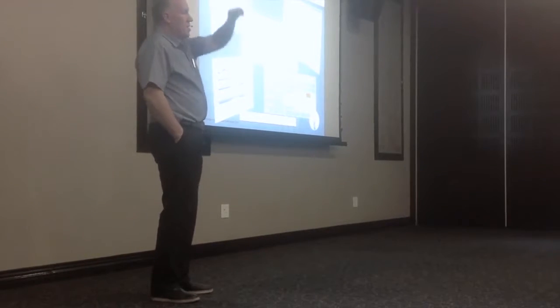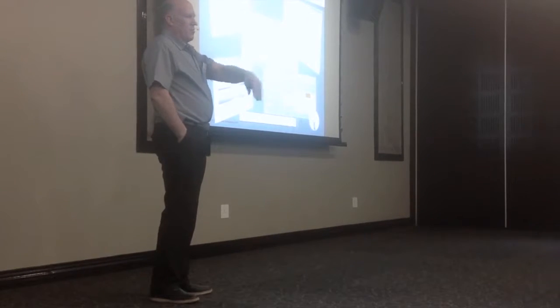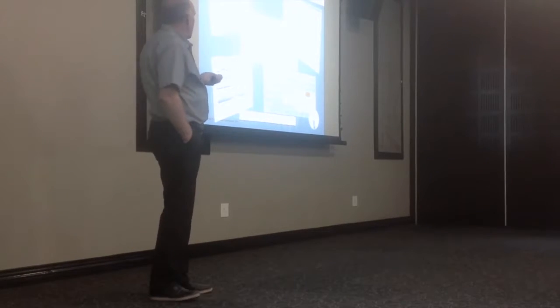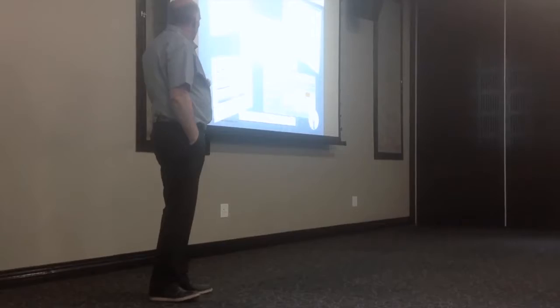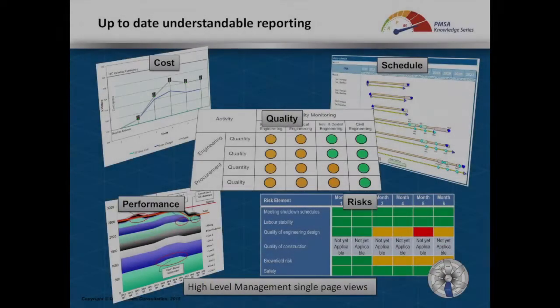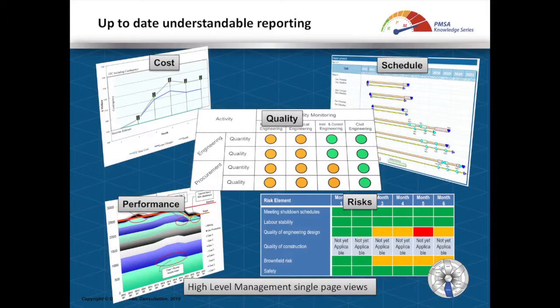And in some way, I think from a management view, people at different levels need different types of detail and so on. But at the management level, one needs very simple things. What I'm trying to show here is how the end of job cost is progressing, a one-page quality report, a one-page schedule, a one-page performance thing, how I'm doing against my benefits, and a one-page risk thing.